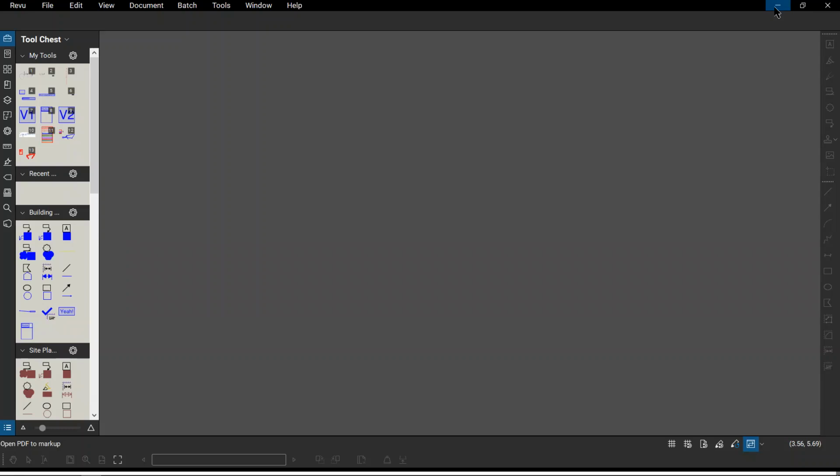No, our city staff will generate the permit card and everything. So it's just part of the process. Once your plans are approved, we will continue the process of getting your permit card. But again, the key thing there is we won't issue the permit card until after all fees have been paid. And then we have all of your affidavits for your contractors in there. Because if you notice on that permit card, it lists the general contractor. They're on there with their license information. So we have to have that on there.